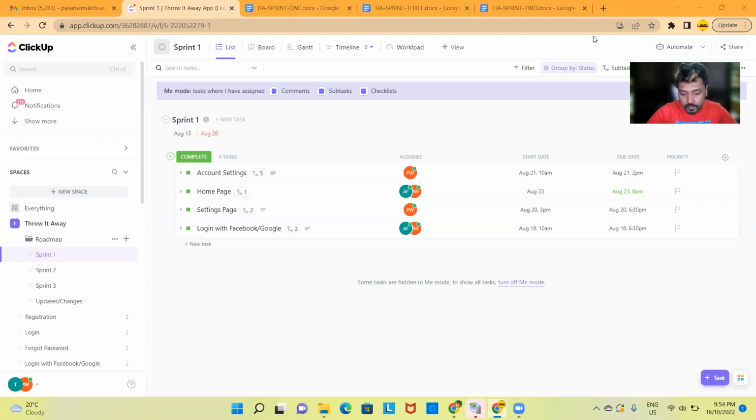As the technical lead, I started a structure for the whole 3 sprints. One sprint is considered a 2-week gap, so every fortnight we carried out our sprint meetings and everything. But at the initial stage I came up with a structure to start developing in order, because this is a mobile application. So I'll start off with sprint one.